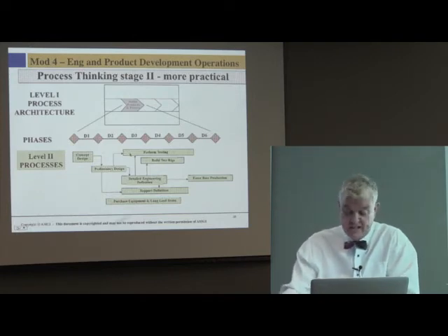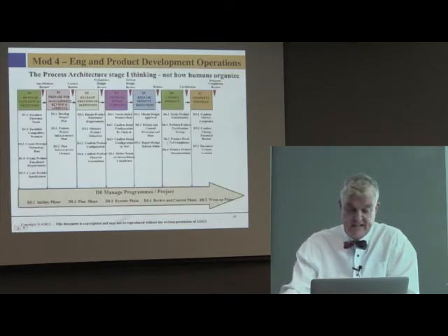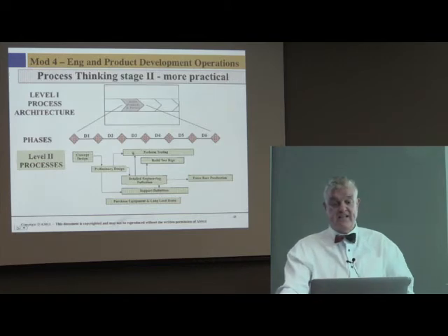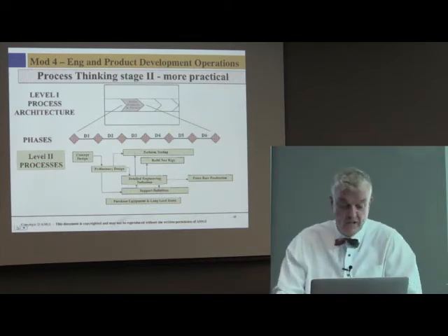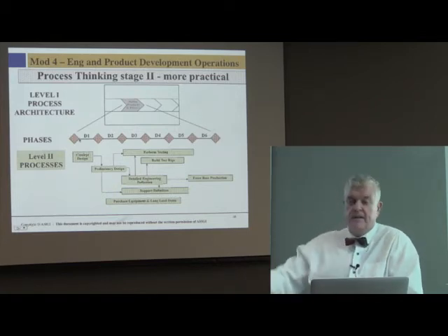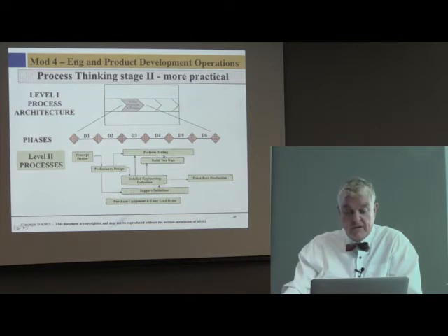Similarly, when you do testing, you don't do testing at the very end here. There's testing happening all the way through. So you're doing early testing even at the design stage, building test rigs. So we realized this approach where processes weren't happening in between milestones, they were happening across milestones.